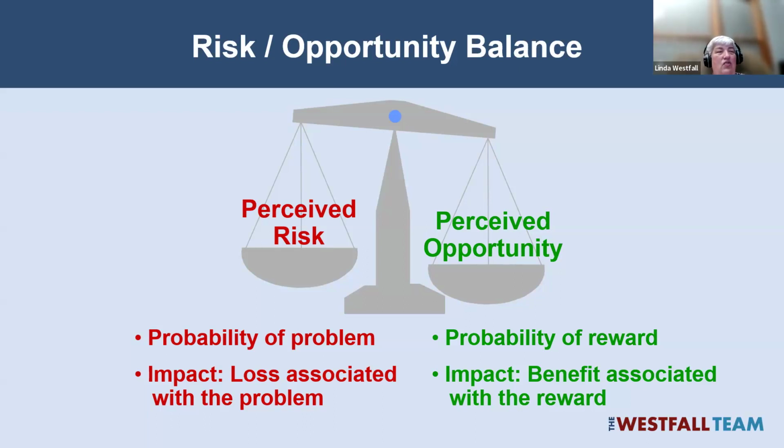And what we're doing is we're mitigating the risk. We've done the analysis. We really want that $50,000. The opportunity is great, but it's still not in balance with the risk. So to mitigate the risk, we have to actively attack the risk side of the equation, either by reducing the probability you fall. For example, we could get you out of your 5-inch stiletto heels down into a nice tennis shoe. We could make the board wider. We could even make you practice and train down on the ground until you get really good at it.